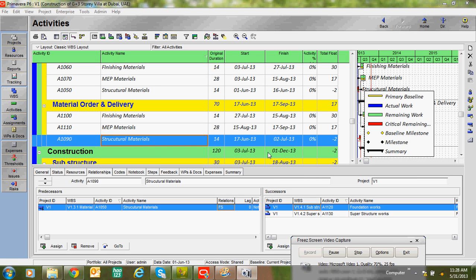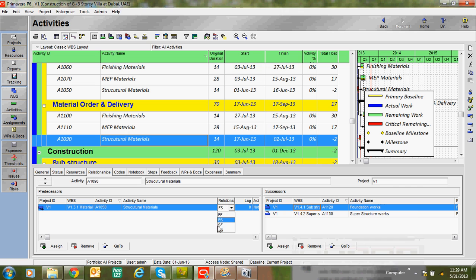Welcome to PrimaveraEngineer.com. In this class we are going to see about relationships. We have four types of relationships: Finish to Finish, Finish to Start, Start to Finish, and Start to Start. The default relationship will be Finish to Start.